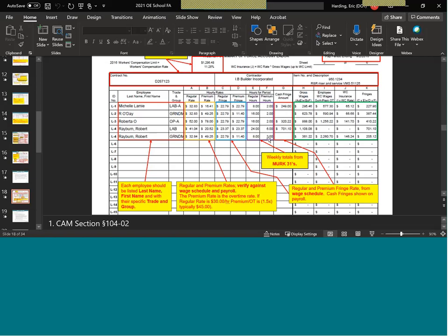One thing I do want to mention on recording hours for both labor and equipment, I think the spec says the hours should be recorded to the nearest half hour, which is a good practice. I don't want to see decimals. I mean, 0.5 is okay, but I've seen crazy numbers, like quarter hour, eighth of an hour. That just makes it difficult to review, and I think the spec allows for a half hour increment.